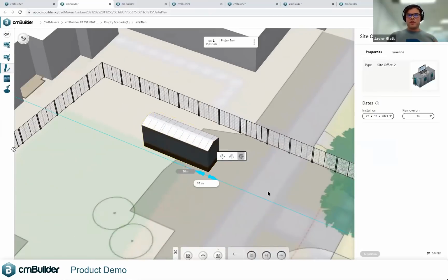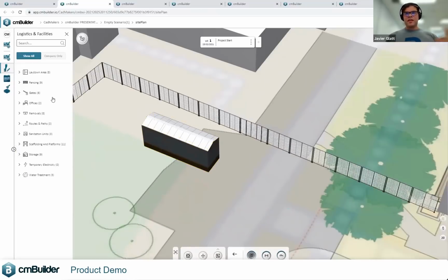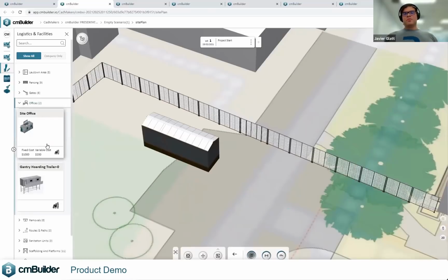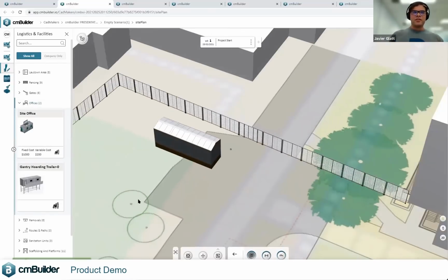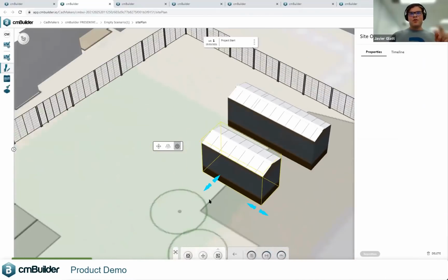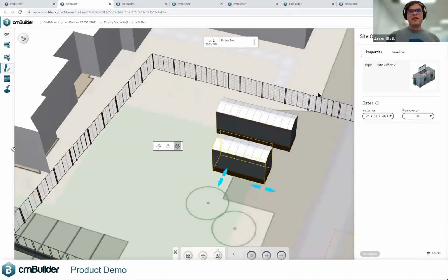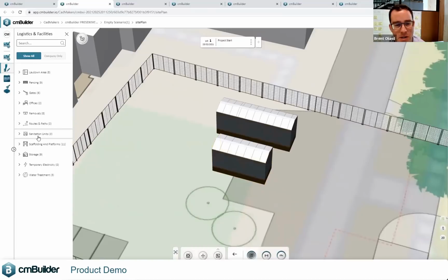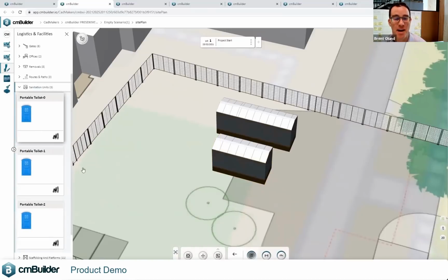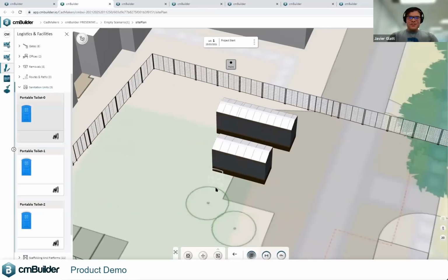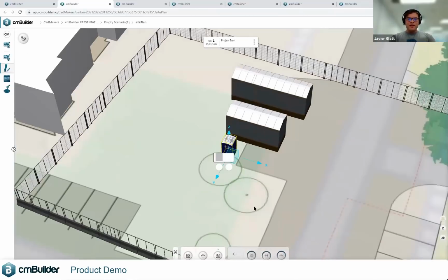So if you have a parametric trailer, you can start planning, okay, if I'm going to have over 50 people on site at any given time, we need to have 4 porta potties. We have to have the appropriate amount of accommodation area for your trades, your sub trades, and lay it all out. I know the actual project, Brent, you didn't have that much space, so good job, Pedro, cooking the books. Yeah. So we're not going to do every single thing here, but you get the idea.